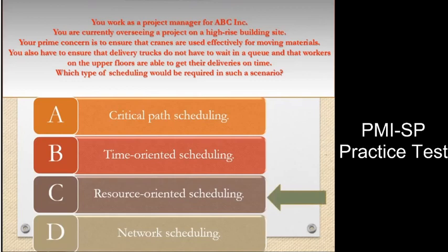Answer. C. Explanation. Resource-oriented scheduling focuses on using and scheduling particular resources in an effective manner. This type of scheduling should be used whenever there are limited resources available for a project and the struggle for these resources between the project activities is intense. As a result, delays are likely to arise in such cases, as actions must wait until general resources become available. Resource-oriented scheduling is also suitable in cases where unique resources are to be used, such as when there is only one excavator available in an excavation operation.